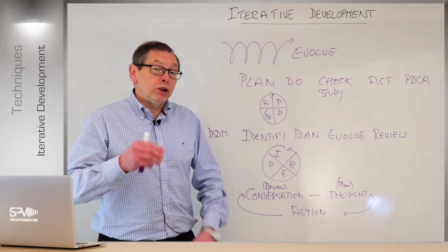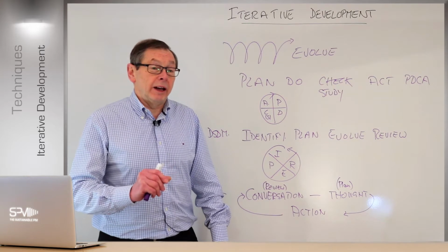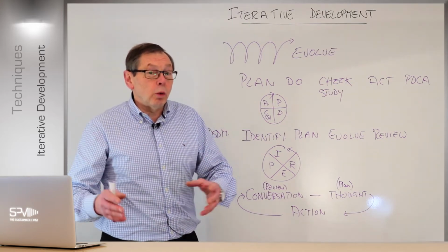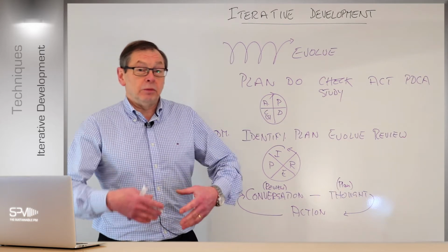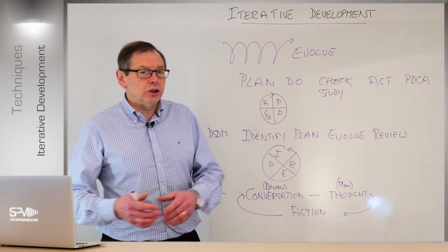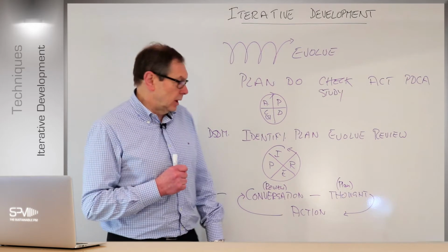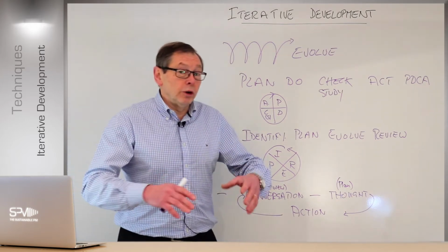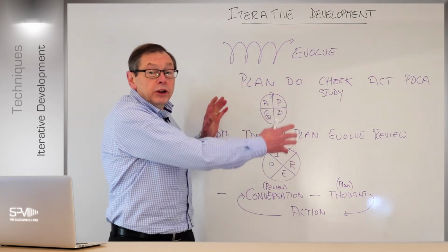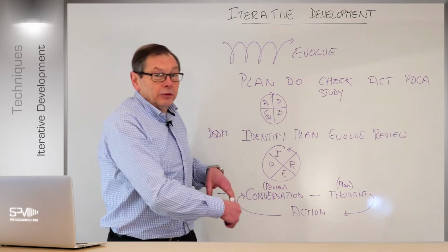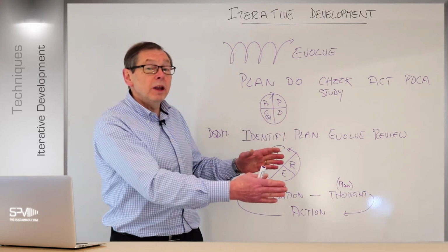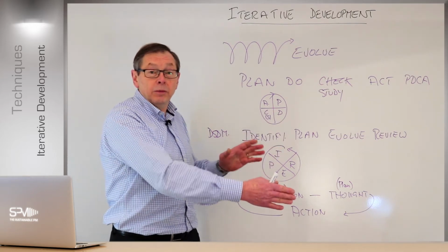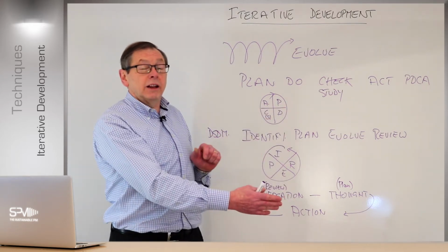But remember, we do have a contingency to help us with that now, and that is on the coulds, or the ones that are not so necessary to the solution within that particular time frame, time box. Right? Remember, time box is generic. We'll look at time boxes a bit later. But what we're doing is using the time box to control the iterative process. Otherwise, you can probably guess it could go on and on. But we say, no, we've got a time limit with the work we've put into that time frame, the time box. It's going to shut down at that point.